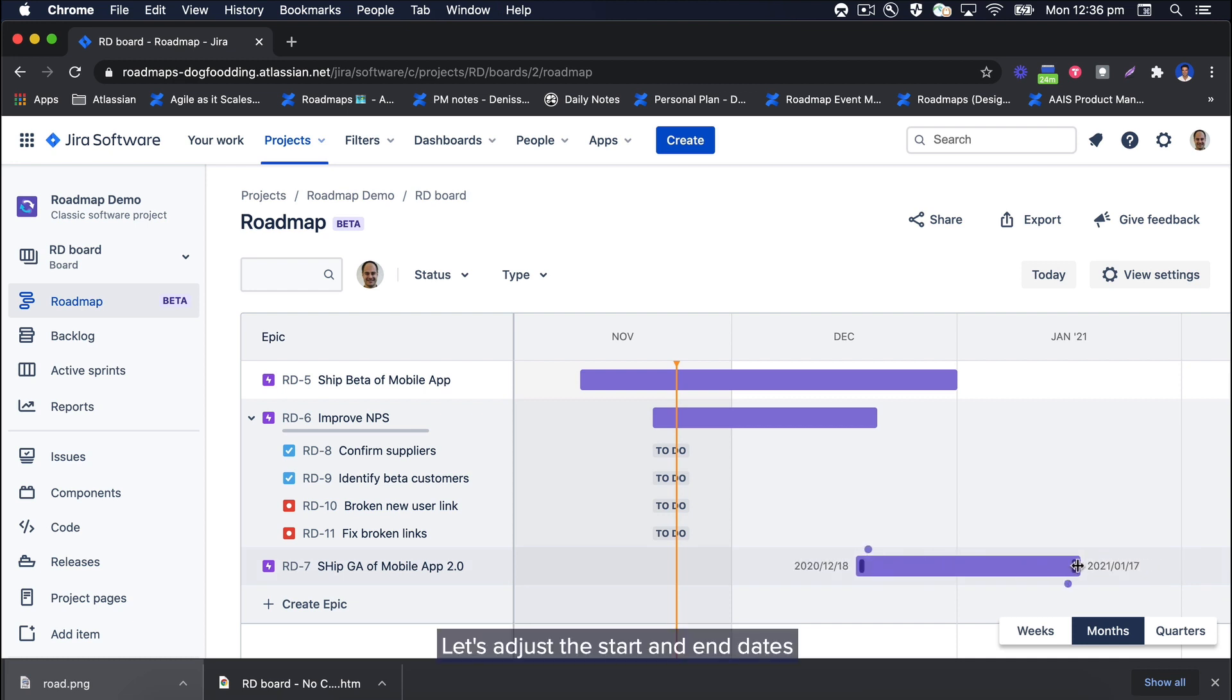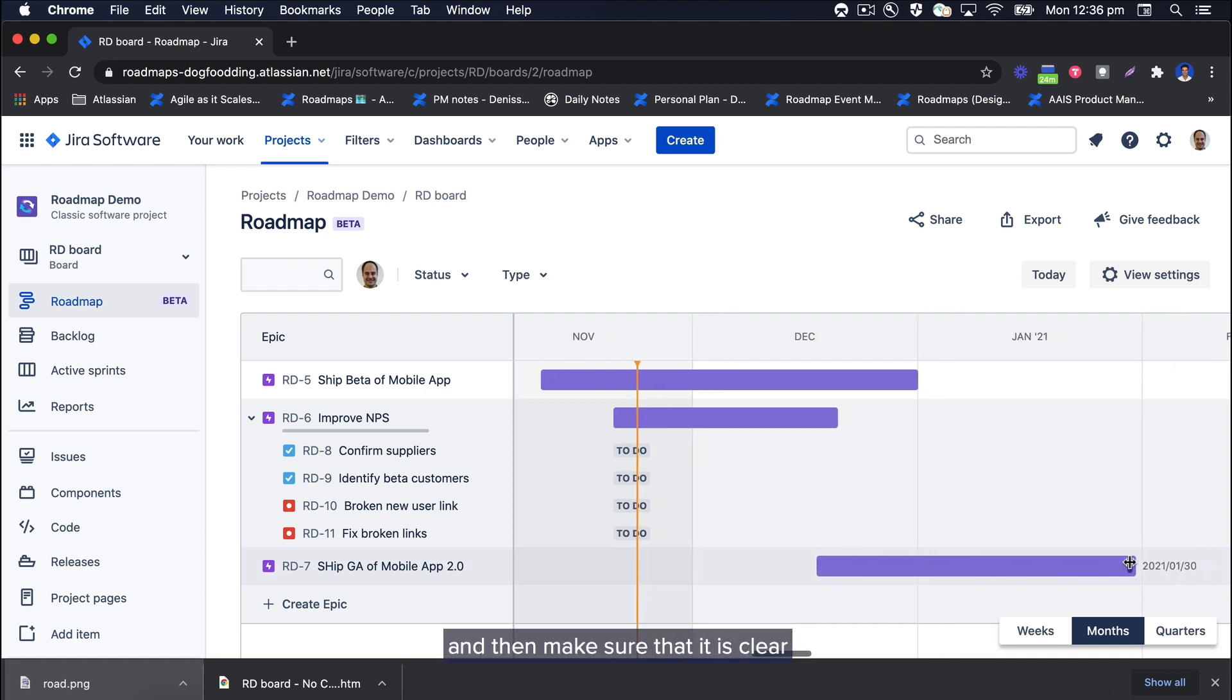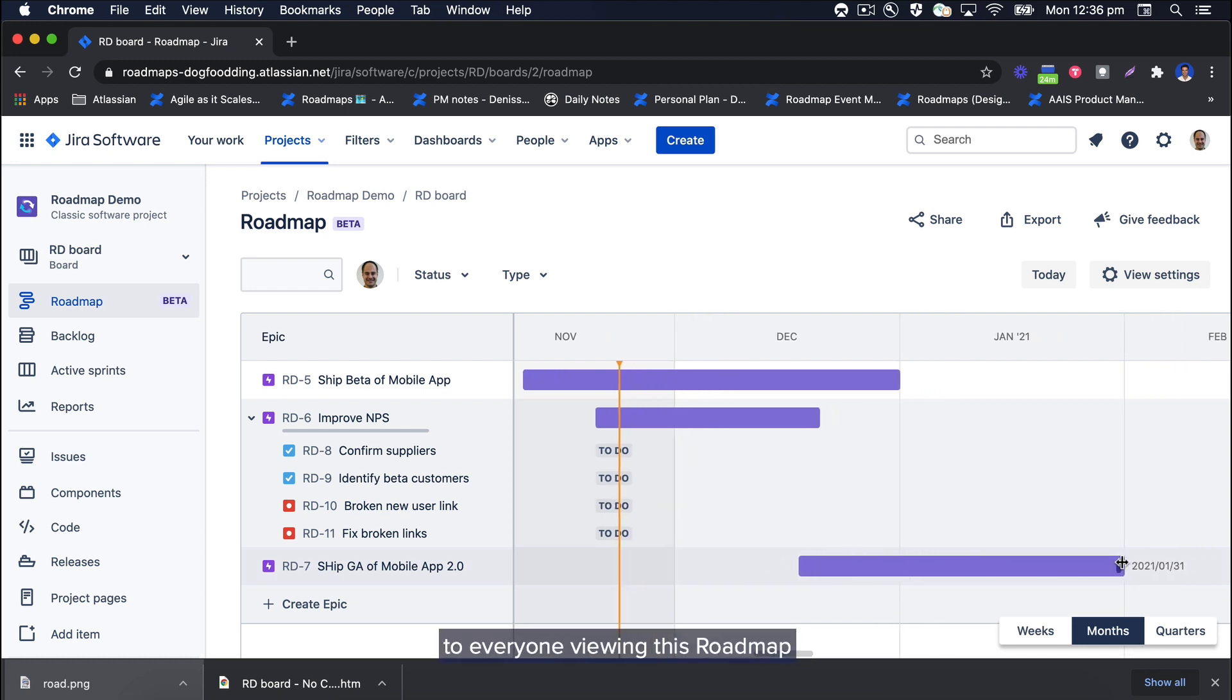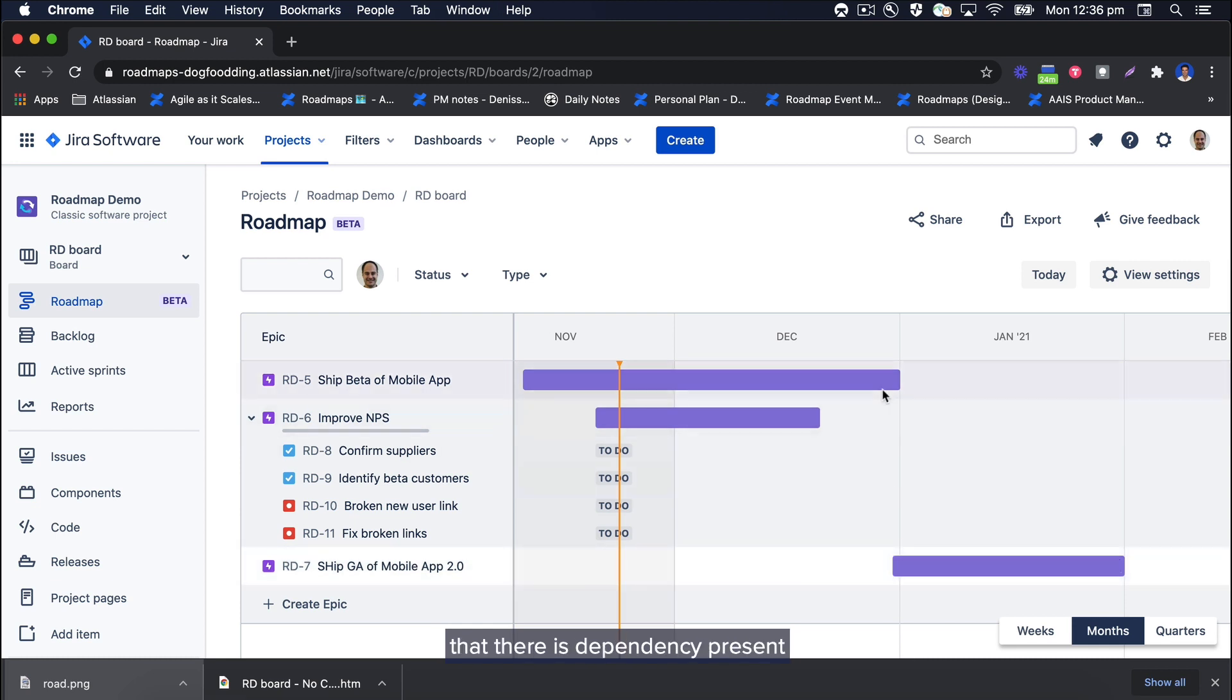Let's adjust the start and end dates and then make sure that it is clear to everyone viewing this roadmap that there is a dependency present in the delivery of this project.